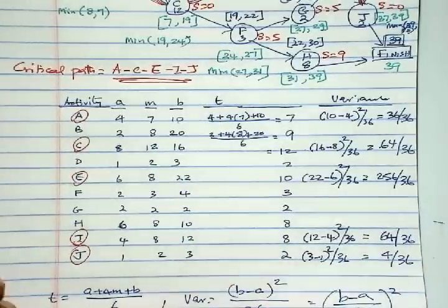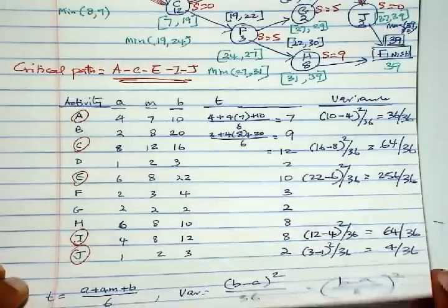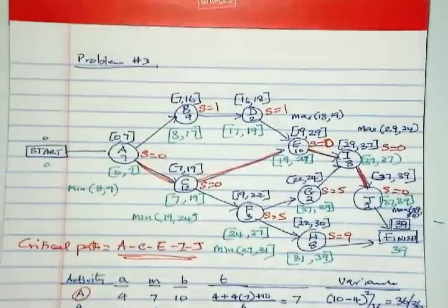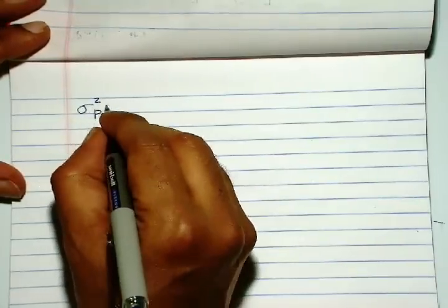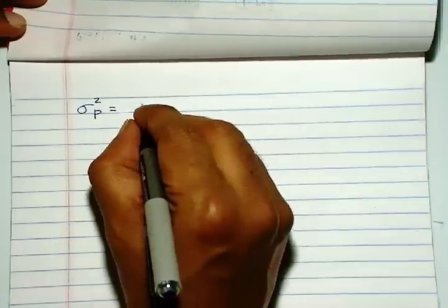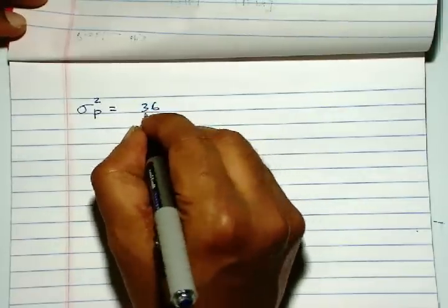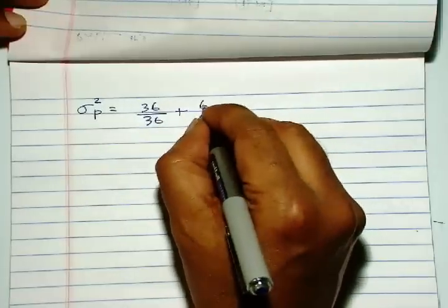And so the standard deviation is the square root of 11.7778, which is 3.4319. So now we have the standard deviation and the project completion time. Expected project completion time we know is 39. So given these two, we can now compute the probabilities that we want.